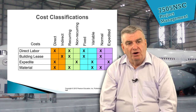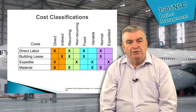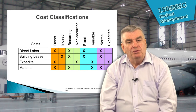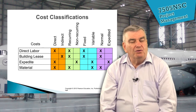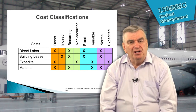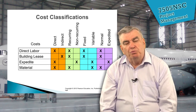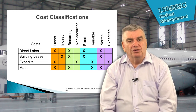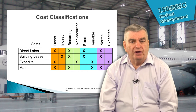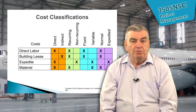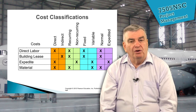If we look at cost classifications, we have a whole range, divided basically into four different headings. First, we get direct and indirect costs. Direct costs are those you can see immediately. Indirect costs are what you need in the company to support the project — for example, IT might support your project, but it also supports lots of other functions in the organisation. So this is an indirect cost — you use the service, but you can't see it directly.